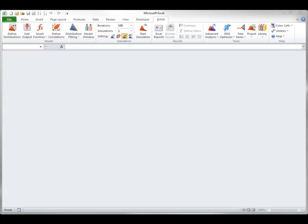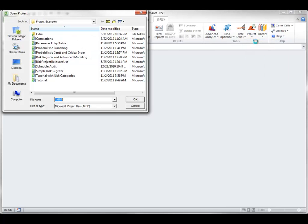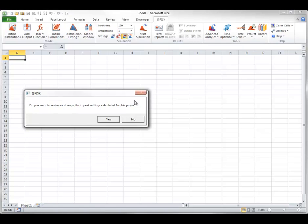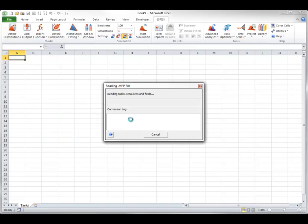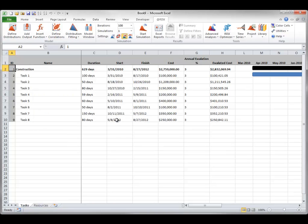To use a Parameter Entry Table, you first need to import a project into Excel. To do this, select Import MPP File from the Project drop-down on the At-Risk ribbon, and locate the file Parameter Entry Table available from the At-Risk example files to import this project into Excel. Then select Parameter Entry Table from Model Tools on the Project drop-down of the At-Risk ribbon.